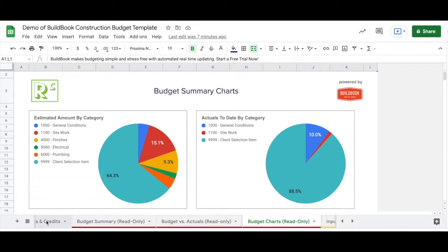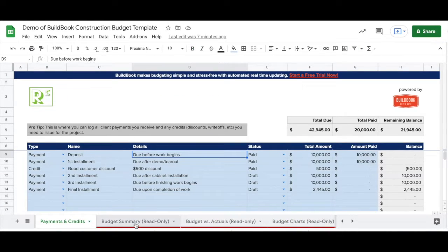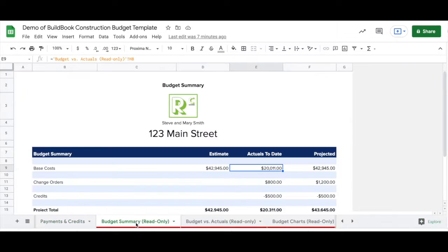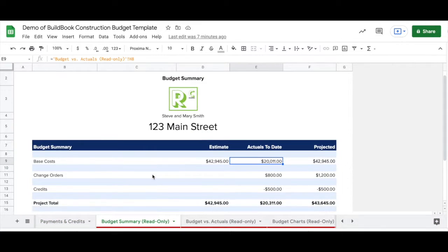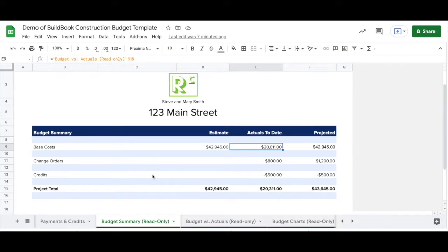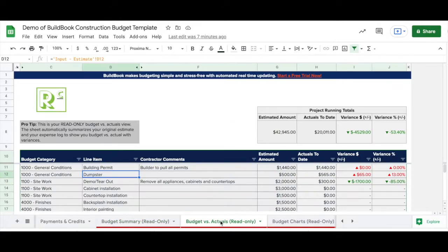As you're going through the tabs, you'll notice color-coding. Anything in blue is something you can change. In the red color-coded tabs, you'll find the budget summary where you can see the summary to date, which rolls up all your expenses, change orders, and credits applied to the project. The values get summed up from the other tabs when saving individual line items.